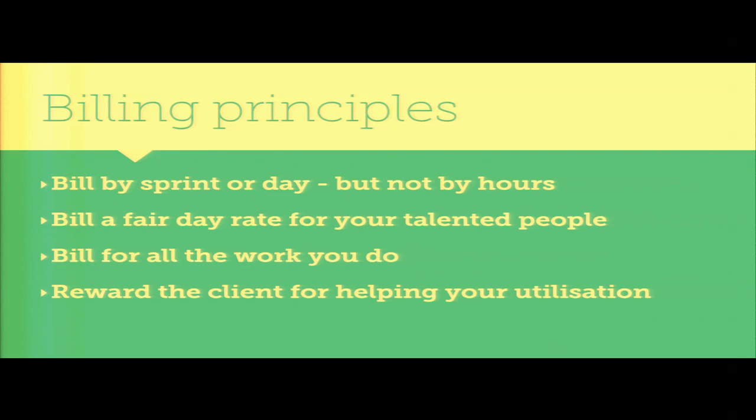Other things with the billing. Billing by hours is really inefficient and complicated. You've got the context switching all the time, with developers constantly thinking, well, now, what was I doing there and what was going on there? Clients should be booking people by the day or even by the sprint on any reasonably large project.